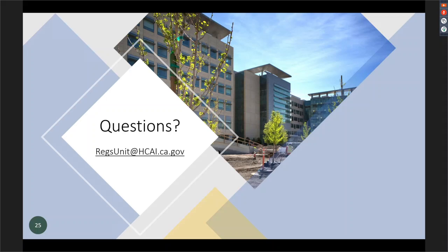An ASI is an architectural supplemental instruction to the contractor to clarify something that might have been missed or not real clear on the drawings. And that's initiated by the design team, either an ASI or an SI. We are not trying to get rid of those.